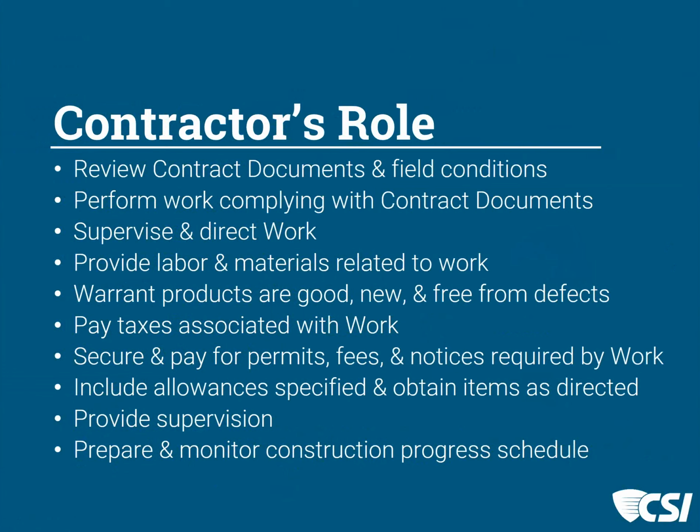And the way that they're doing that is supervising and directing the work, being sure that the necessary labor and materials are there to perform the work, and that they are the right materials for compliance with our specifications. They're able to be warranted, they're new, they're not used, they're free from defects, and when they're in place, they're paid for, taxes are paid. Before work started, permits, fees, anything that's required by the contractor are paid. Sometimes the owner will pay some of those, but typically they fall to the contractor.